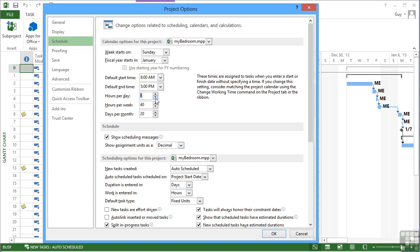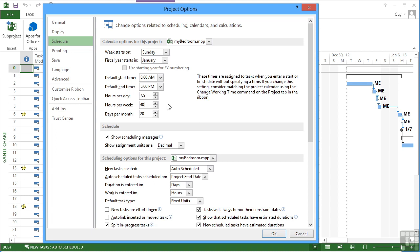You'll notice that the up and down arrows only go up an hour at a time, but we can change that by typing in the point five. Now the hours per week is how many hours per week. So if somebody puts a task in as 1W, which is a week, it converts that back down into hours so that it can work out the working time, and it will assume a week is 40 hours long. Well, if a day is only seven and a half, a week can't be 40, and in fact our working week would need to become 37.5.